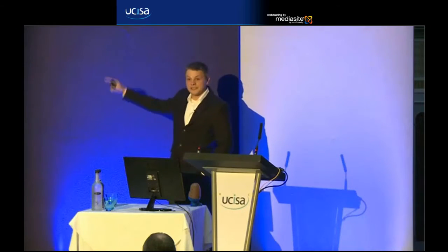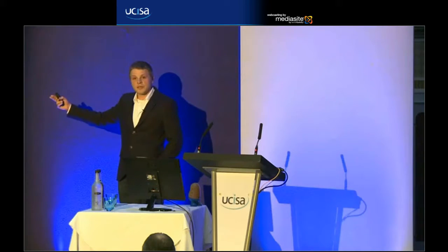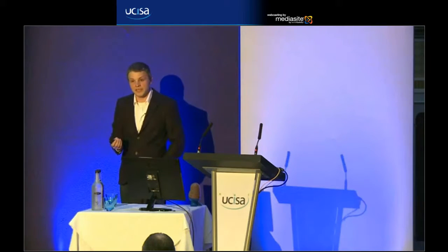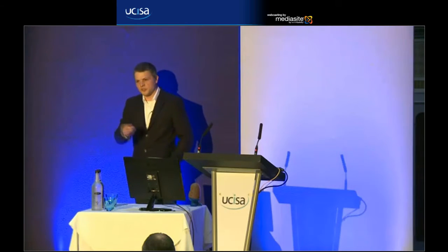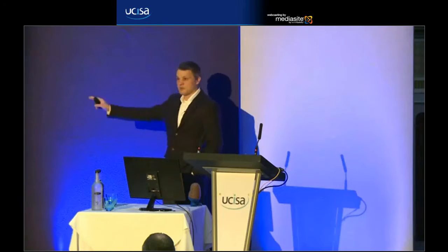Now, that is quite significantly different to the rest of the votes. And this is quite important as well, because what we can now have is a discussion with that person, because one of two things might have happened. Either they have misunderstood something that we've been talking about, and so they've overestimated it, or they've actually thought of something else that nobody's thought of.